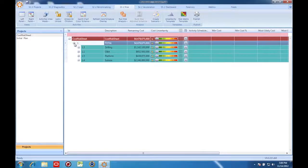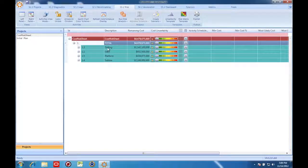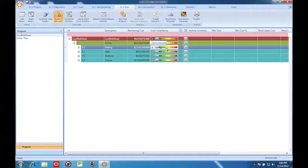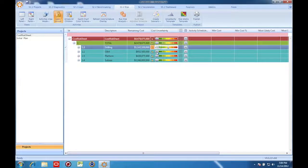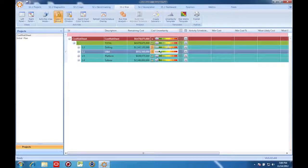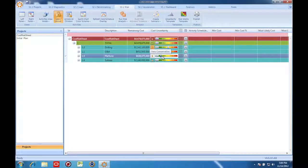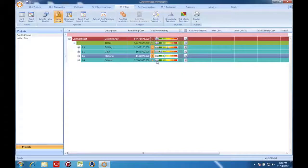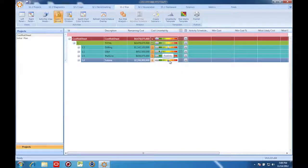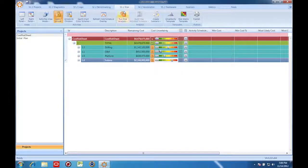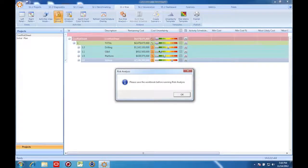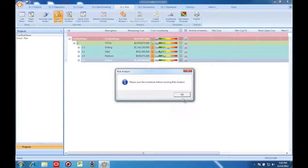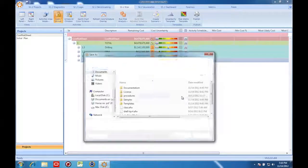Here I'm first going to apply some uncertainty factors to my cost model. Now that I've applied some uncertainty factors, I'm going to run the Monte Carlo simulation.